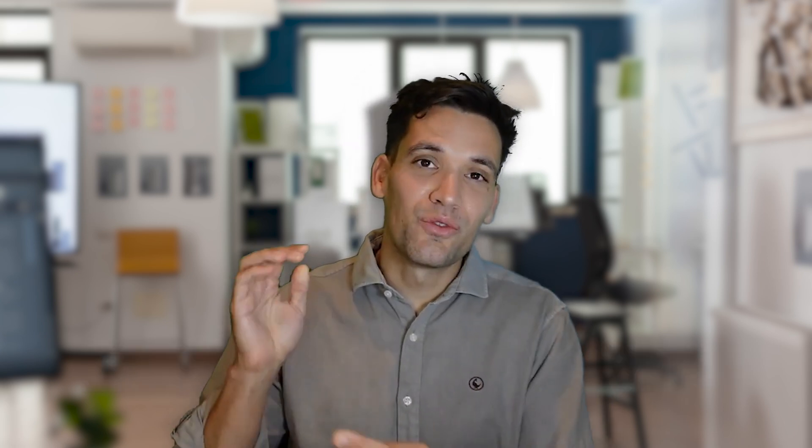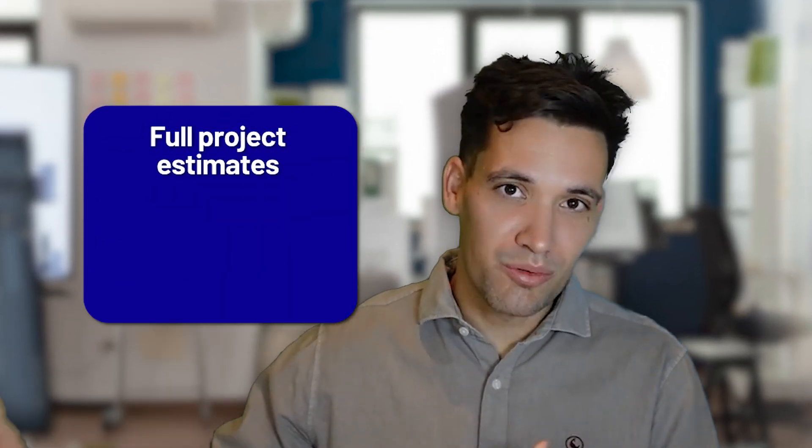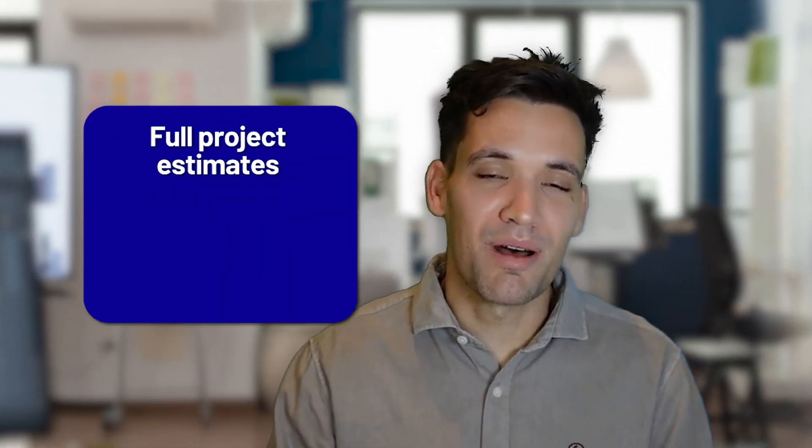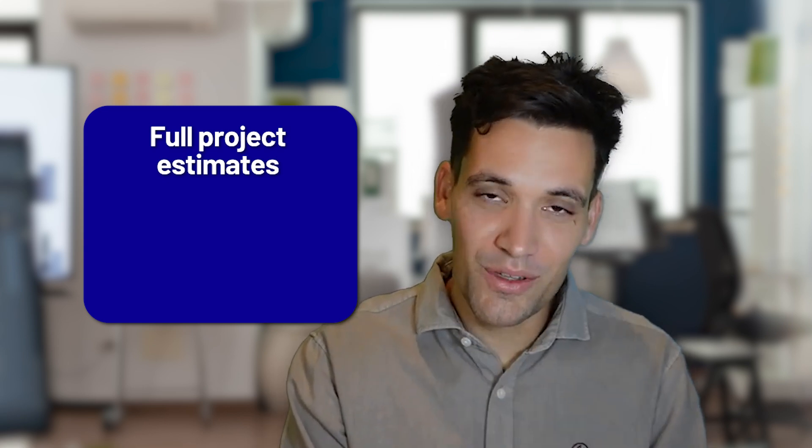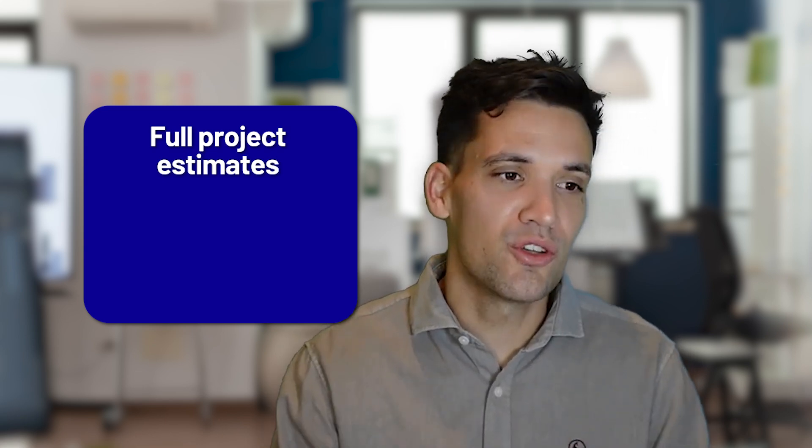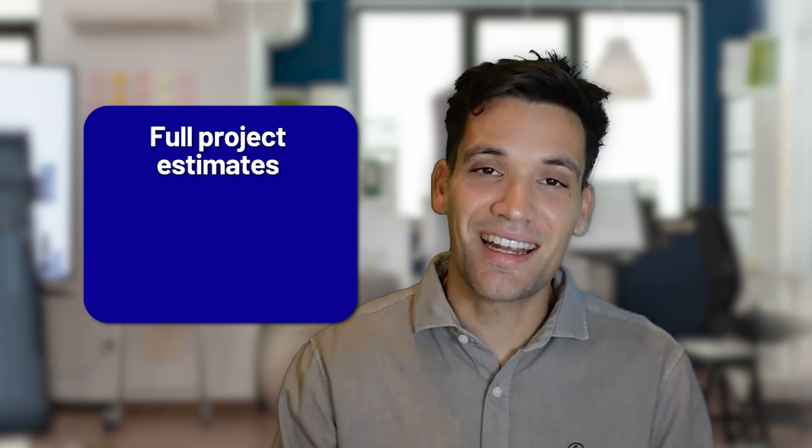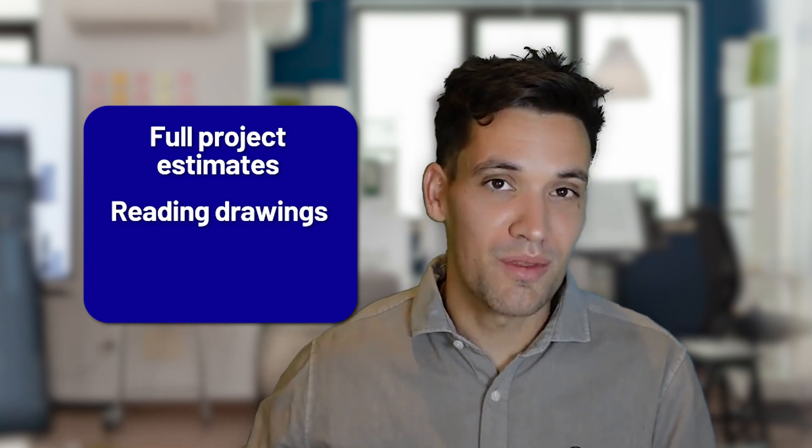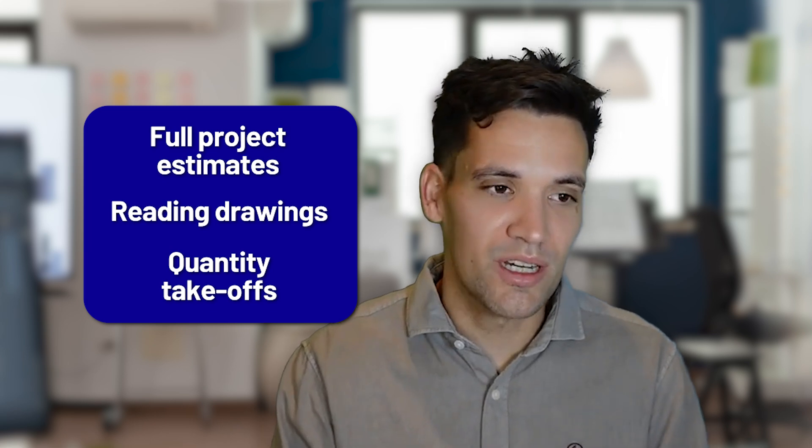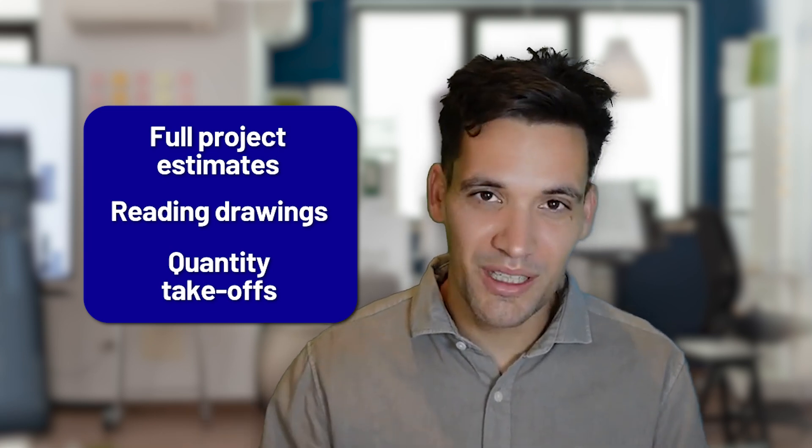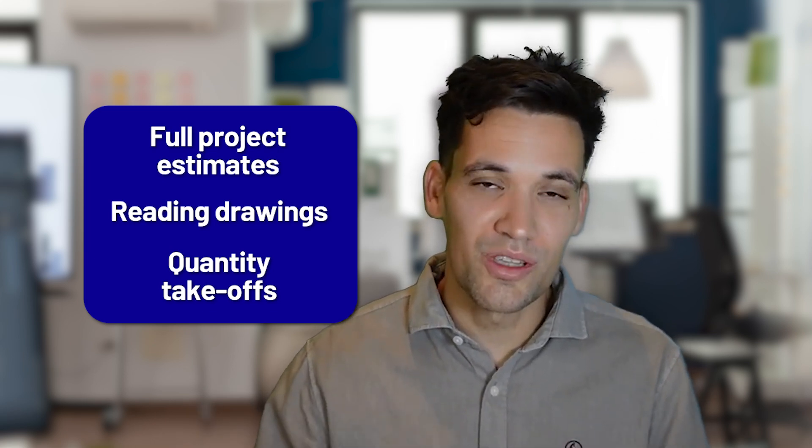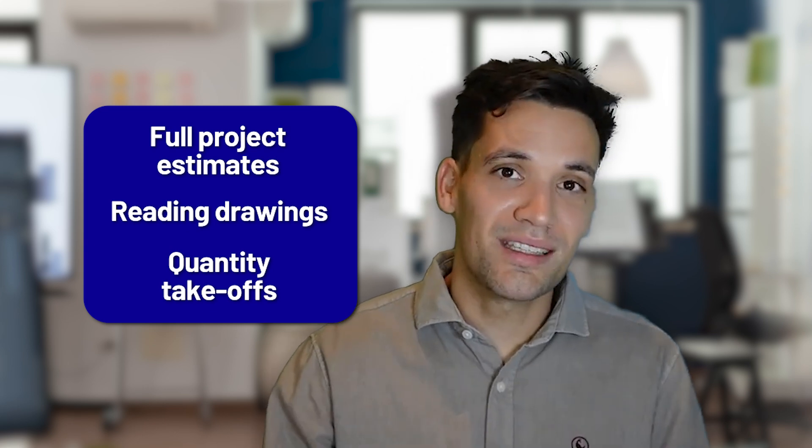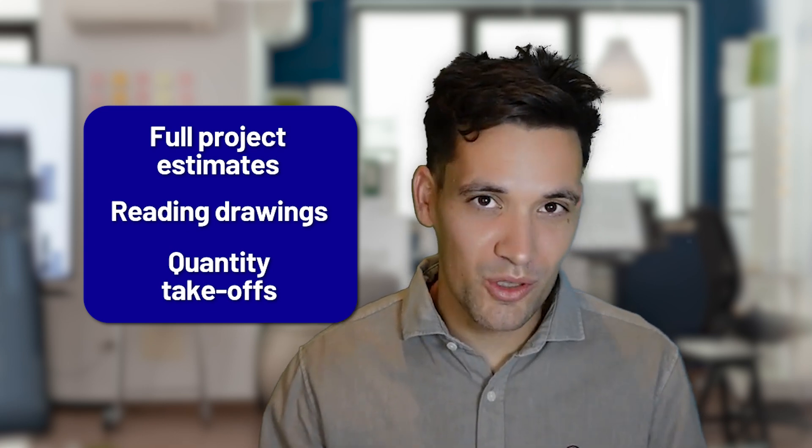Now, what I have found it's particularly bad at is full project estimates. When you start to have larger projects with complicated scope, it does tend to fall apart of it. It's good for specific budget pricing as I've shown you. It's terrible at actually reading drawings and applied from this doing quantity takeoffs. I've noticed it's really bad at reading drawings, particularly when you get complicated structural drawings with section views and things like this. You just can't do it. And from this, it makes it almost impossible to do accurate quantity takeoffs.